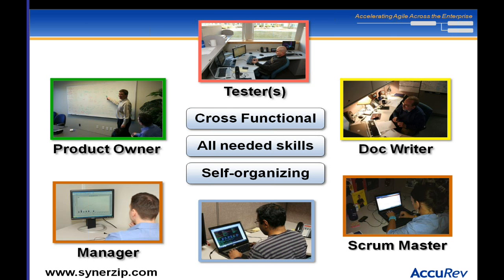A cross-functional team means you have all the skills: a tester, a doc writer, a scrum master, a manager, a developer, a product owner — all the functions you need to get work done on a particular project, also self-organizing. This team is going to be estimating user stories in story points and doing the actual work. Ideally in an agile team these folks are not shared across projects, so their entire fully-loaded salary and overhead goes into calculating the cost, making it a lot easier.